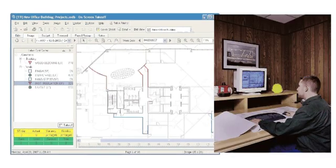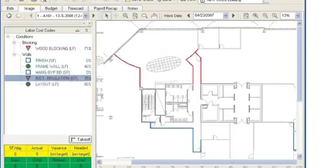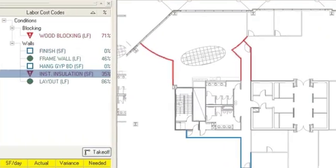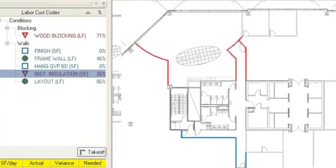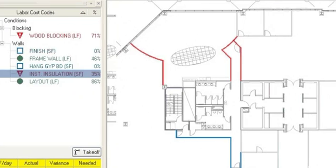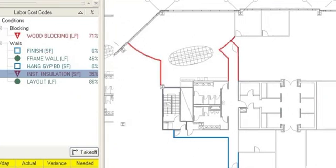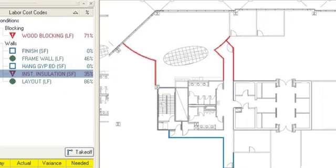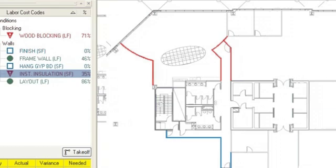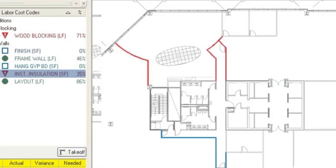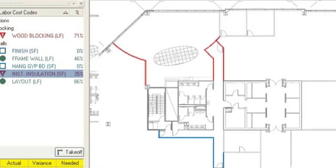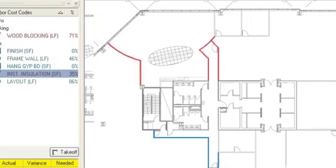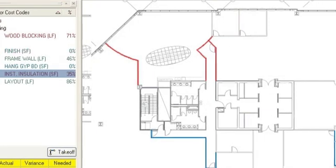By automatically displaying the failing labor productions in red, Digital Production Control helps the project manager immediately identify the snag in production and to see exactly what is happening in the field. Using this vital information, the contractor is able to make the necessary adjustments to prevent any overruns.